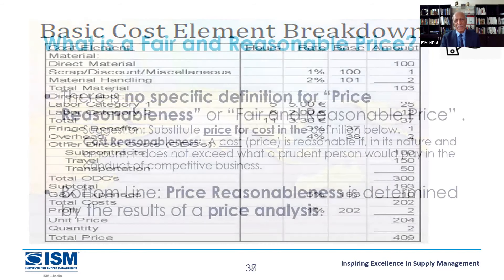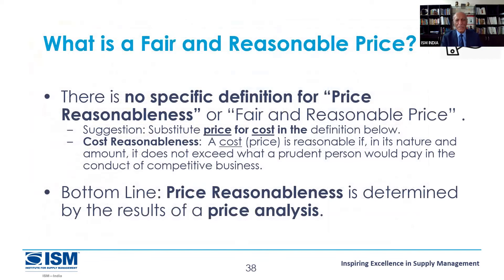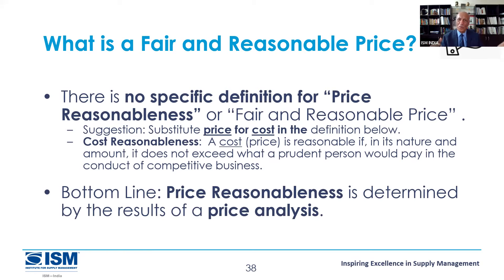Coming back to defining what is clear and reasonable: there's no specific definition. What we do is look at previous prices, examine cost details if competition is low, try to come up with a justification that yes, this is reasonable. We also look at what competitors are doing — if competitors are selling at a much lower price and ours is on the higher side, there is no justification. Price reasonableness can be done with price analysis, but only if there is an adequate number of competitors.